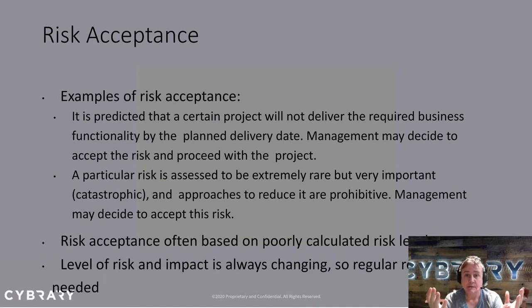In a project, I just found out that software we need to conduct this project is delayed by 3 weeks. It's going to mean that our project finishes 3 weeks late. Sometimes you just have to accept the risk. Now, a lot of times when it impacts your project estimates, it might indicate that you didn't appropriately calculate risks earlier on.